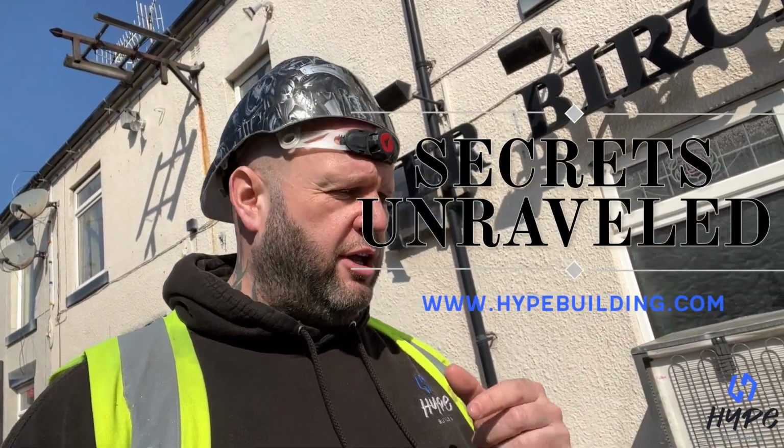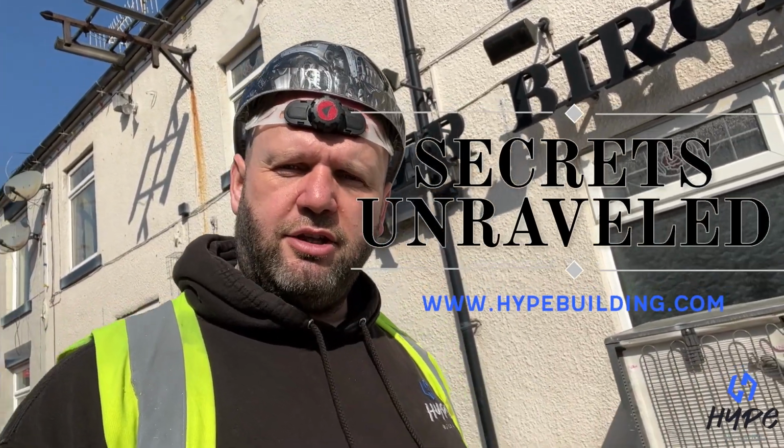This video especially is a good example of why you need a contingency fund. It's a good example to find out at this stage. After the rip out's been complete is the stage that you find the majority of the extras. So there's a couple of live examples in here, nothing major, but some live examples of the things that you need to look out for. So that's a good example of this video. It's also just a bit of a project update as well to see where we are and progress so far.